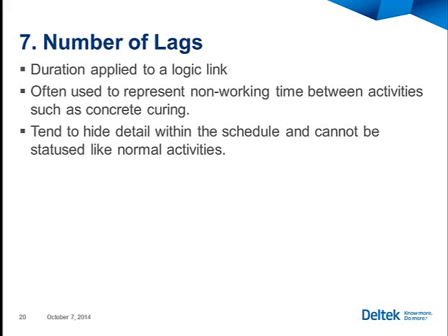And then I become concerned that we're not managing that work to the same rigor that we're managing the other work in the plan. We're not saying lags are forbidden, and you might have a certain tolerance for them, but when I see a high number of lags, more than 5 or 10% of the activities in the schedule with lags, I become concerned that lags have been used as a planning methodology rather than an occasional exception, an occasional wait time, which is what I expect them to be used as. So I'm not here to say all your lags are wrong. I'm here to say when we see generous use of lags, we see situations where descriptions and resources could have been applied rather than hidden duration between activities.